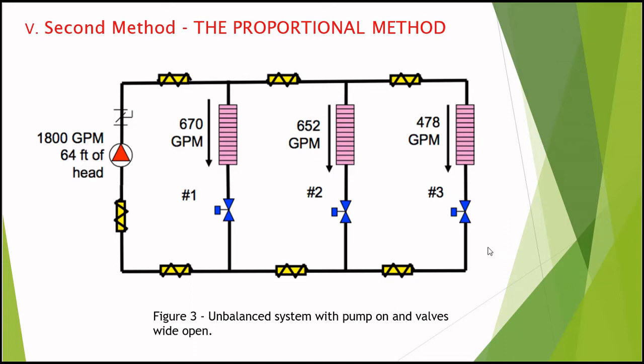Next we will take this reference setup to the next terminal and adjust it as well to get 500, or one third of the flow. And we will go to the next as well, and we will get one third automatically.